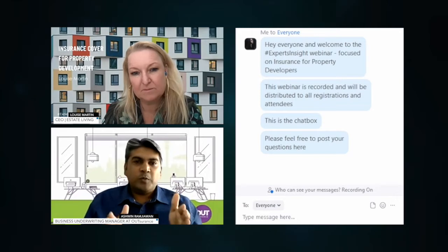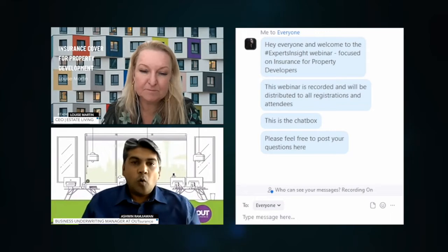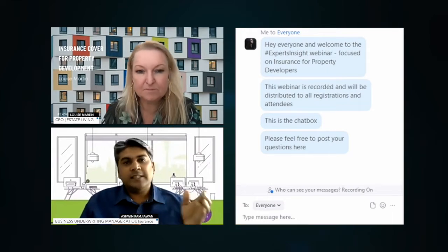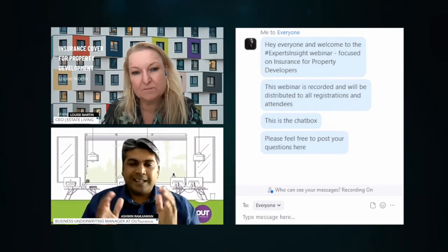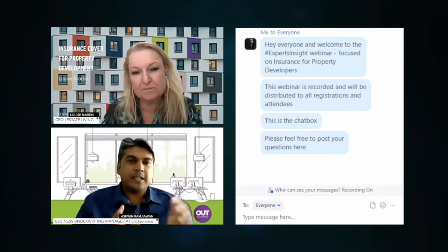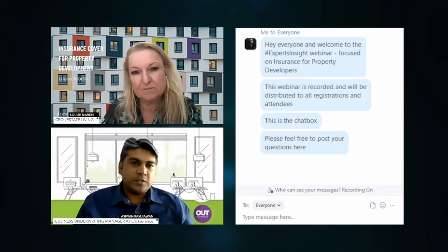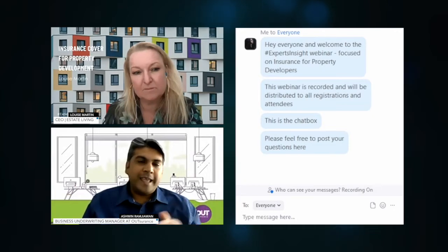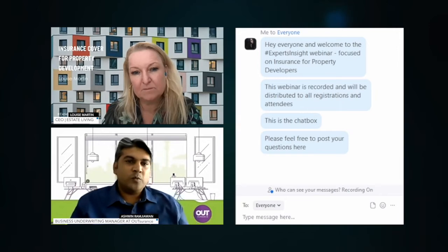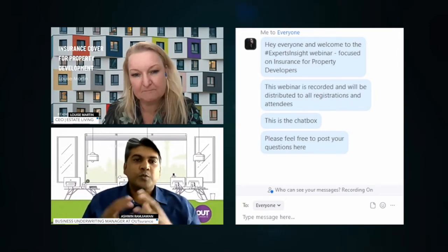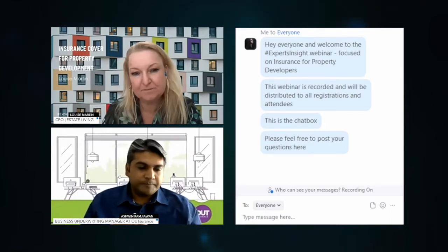And you'd say, I'd like to be covered for this annual contract period. The underwriter will probably structure that policy based on your annual contract turnover. Or alternatively, you might say, listen, I just landed a contract. I need to build a particular property and I just want cover for this specific contract. Then you can structure a specified contract in terms of your contractor's all risk policy. So on an annual basis and or a specified basis as well, depending on what will suit the contractor's budget. And I think it's very premium sensitive based on that as well.